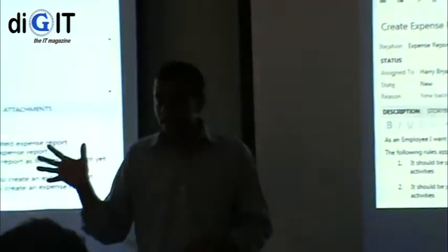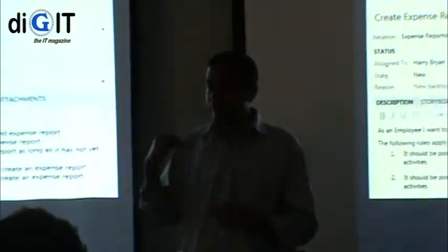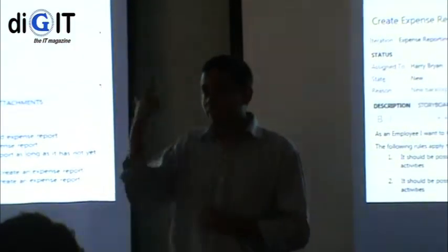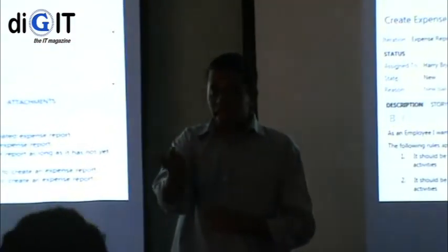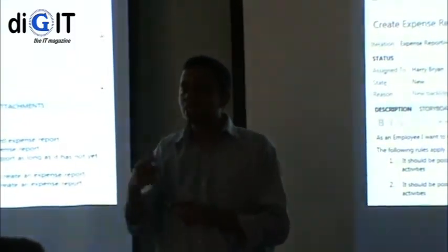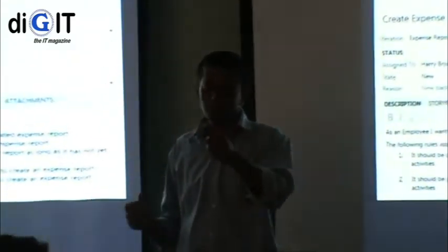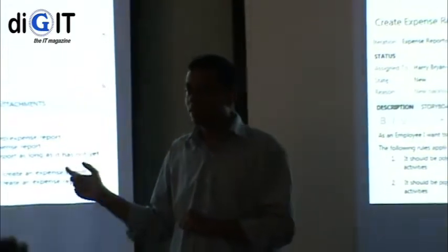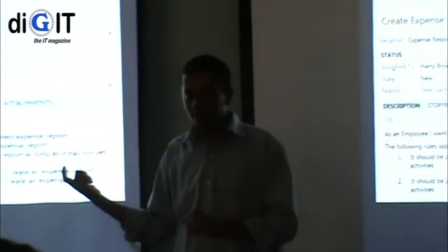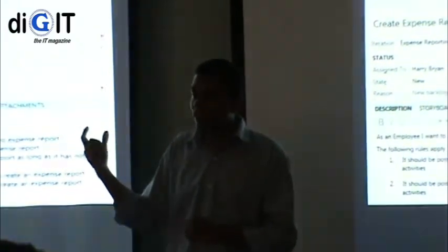So that is one aspect of our program, because we need the traceability. So when we have a bug, we should be able to track the bug back to the original requirement, right? And if there is any requirement change or change request that has come, that should also be linked. So we know how to identify why this bug is there. Maybe the original requirement is achieved, but the change request has not been done. That is why the bug is there, right? So we can trace that. So that is how we achieve traceability.